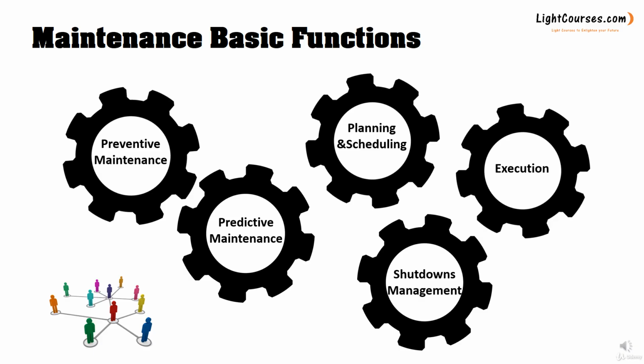You still have to plan for the details of the jobs to be executed. You need to make sure that you acquire all the needed spares, equipment, tools and manpower, because most of the time, during a shutdown, you need to hire more manpower.